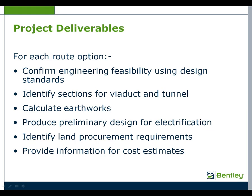The project deliverables for this feasibility study are these. For each route option we will confirm engineering feasibility using design standards. We will identify sections for viaduct and tunnel. We will calculate the volume of earthworks. We will produce a preliminary design for electrification. We will identify land procurement requirements and we will provide information for cost estimates.